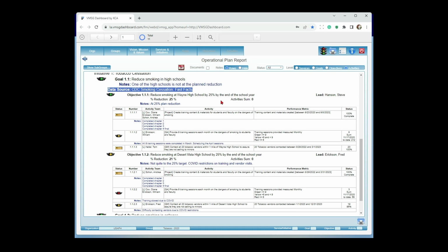Let's say, for instance, I'm working on a plan and I'm supposed to have done updates or done something last month. So I want to go in and put in November 1 through November 30th. What it's going to do is just show me the activities that are supposed to have been completed within the month of November. The other thing you can do is say, what am I supposed to be doing in December? I can put in December 1 through December 30th, and it's going to show me, again, just the activities that are supposed to be completed in December.